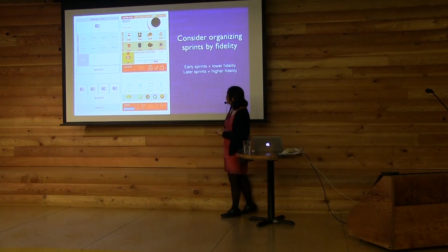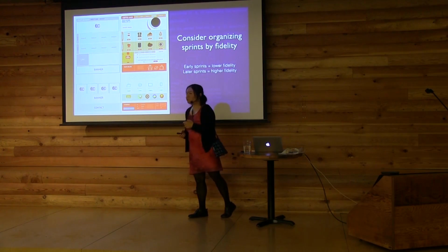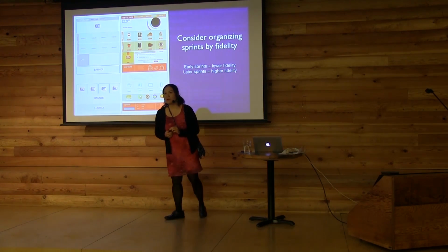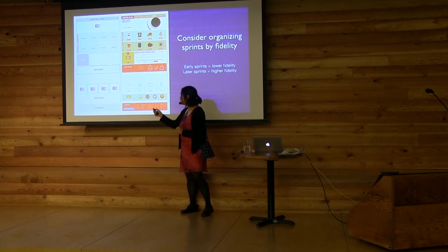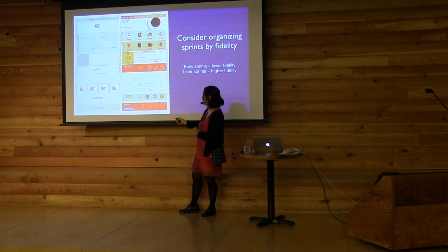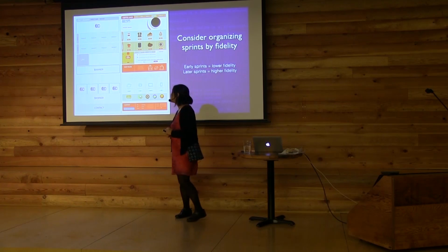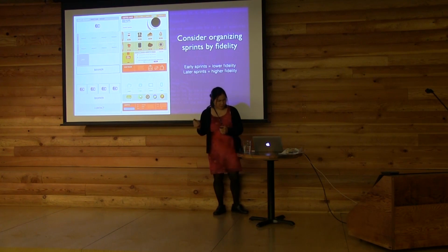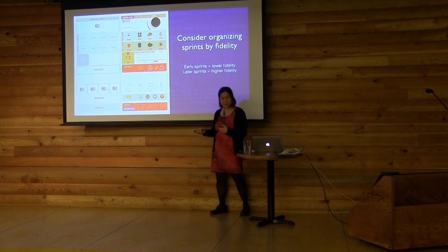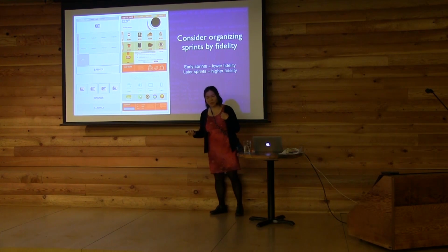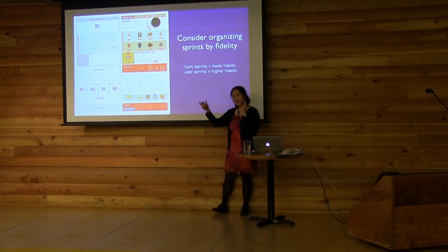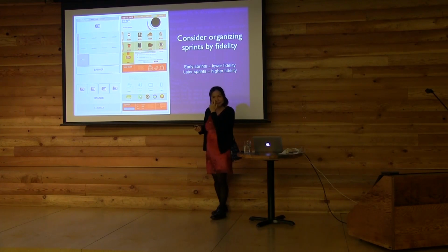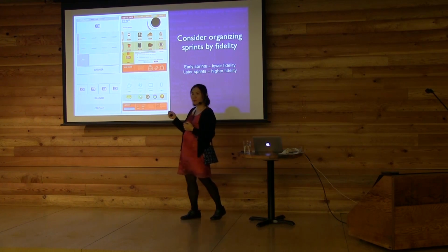Okay. Another practice that can help with this cohesiveness problem is to think about organizing sprints by fidelity. Okay, this is low fidelity design. This is high fidelity design with a lot of details put into it. Many designers, especially if they're working on a new product or a major revision to an existing product, want to get that big picture, want to figure out how everything's going to work together first. And that means that they don't have the bandwidth to think about details early on.